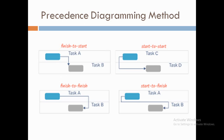The other format is the Precedence Diagram Method (PDM), which is more popular than ADM and shows activities as boxes, using arrows to show relationships between them. The four task dependencies in PDM are: finish-to-start, where task B must start only after task A has finished; start-to-start, where task D must start only after task C has started; finish-to-finish, where task B must finish only after task A has finished; and start-to-finish, where task B can finish only after task A has started.